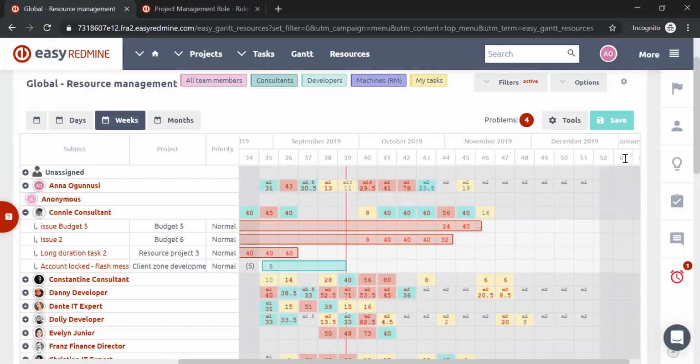The estimated time is automatically distributed throughout the task duration according to the allocation rules, whether we are allocating it from the end, from the beginning, from the middle, evenly, etc. But if we don't like the way the workload is allocated to individual days, we can customize the allocation. So we can manually reallocate it easily, and that's what's called custom allocation.